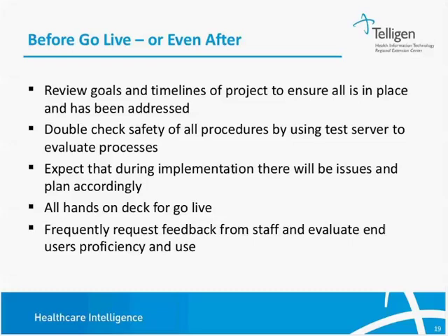You need to expect that there's going to be some issues during the implementation and really plan accordingly. So in other words, have all hands on deck during the go live and those few weeks after when everybody's transitioning into this. And this includes all shifts. If you have night shift nurses that are new, it doesn't mean that they don't need somebody there to help them through it. So definitely having somebody on every single shift and having those super users available. And requesting feedback from staff and evaluating the end users for their proficiency and use of the CPOE system.